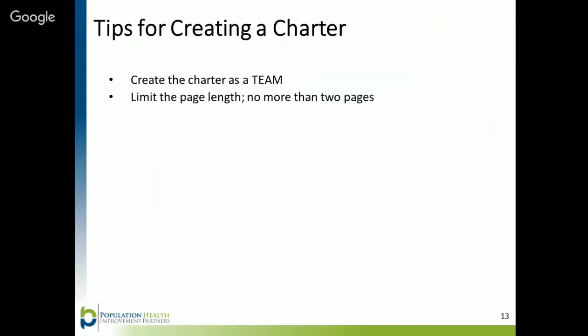Limit the page length of the charter to no more than 2 pages. Remember, it is a concise executive summary of the project. By reading the charter, someone unfamiliar with the project should be able to quickly give a high-level explanation of the project. If needed, you can attach appendices that include more detailed information about timelines, measurement plans, and communication plans.